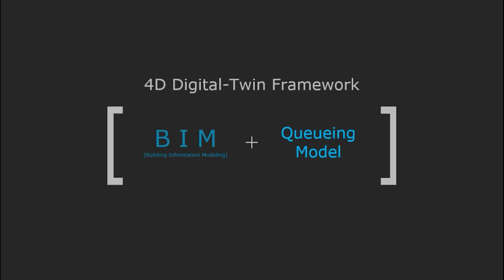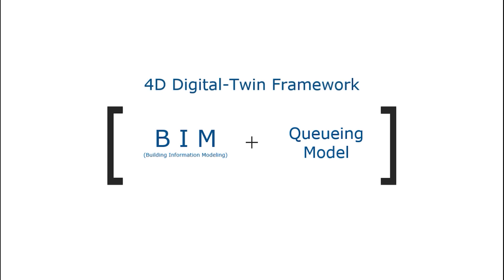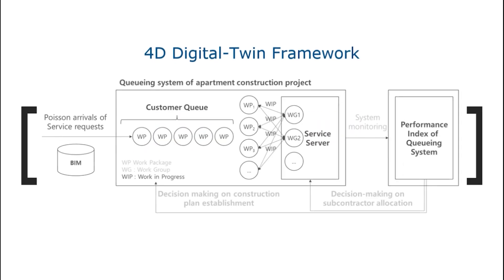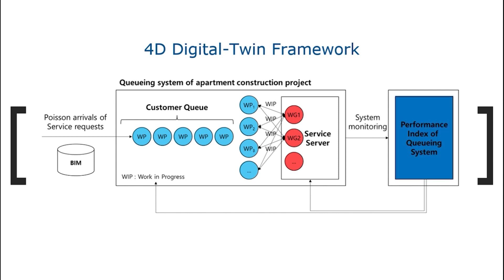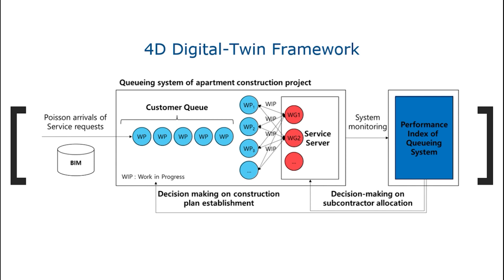The 4D digital twin framework combines BIM-based BOQ as the data server and queuing models as the decision-making model. As described, the complex construction production system is divided into service providers and customers who receive service. In this process, resource allocation is made based on the empirical knowledge of the general contractor. The queuing system of the apartment construction can be expressed as work groups and work packages. Depending on how resources are allocated, the service status of the queuing system changes. The general contractor monitors the system's status through performance indexes, and if performance differs from the plan, allocation can be adjusted at the micro level.